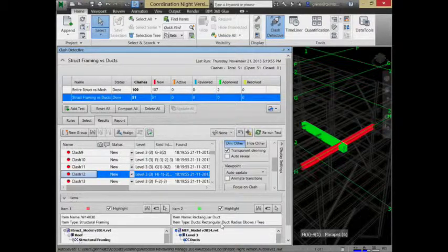Okay, so this is where we want you to get to first, is really just run some clash that has some initial results. Okay, and right off the top, okay, 51 problems here. Before you go ahead and start correcting something, stop, pause, make a report of this, because this is really your baseline if you're going to be improving from. You may not get down to 0, but we know you're going to get better than 51.